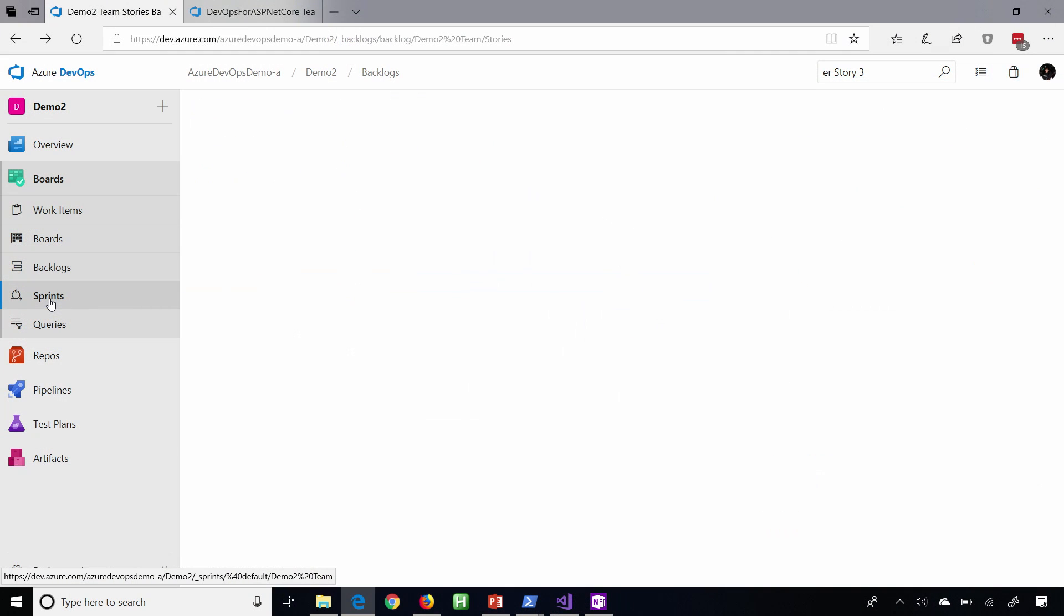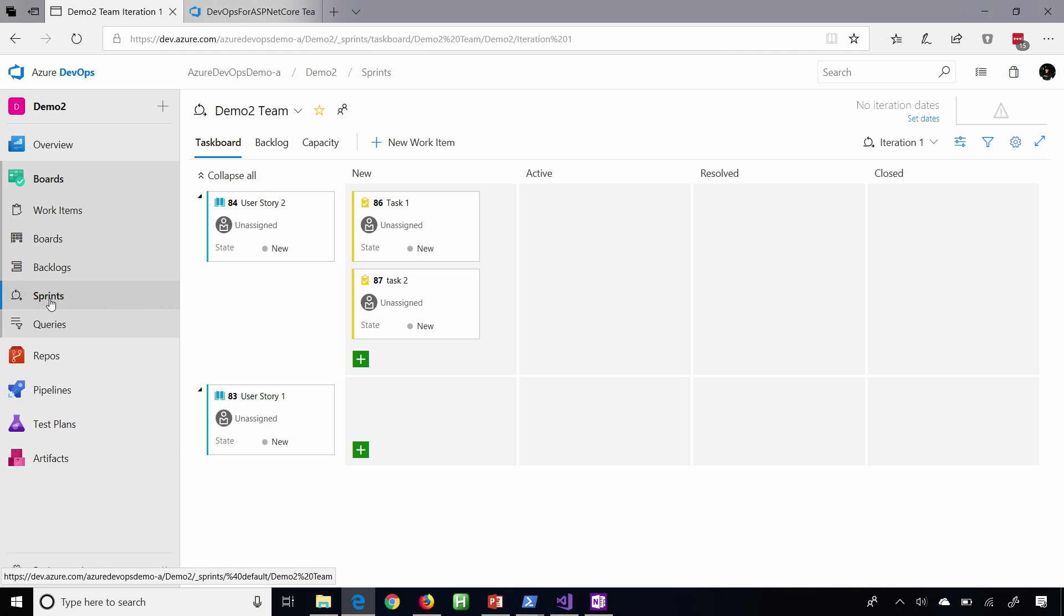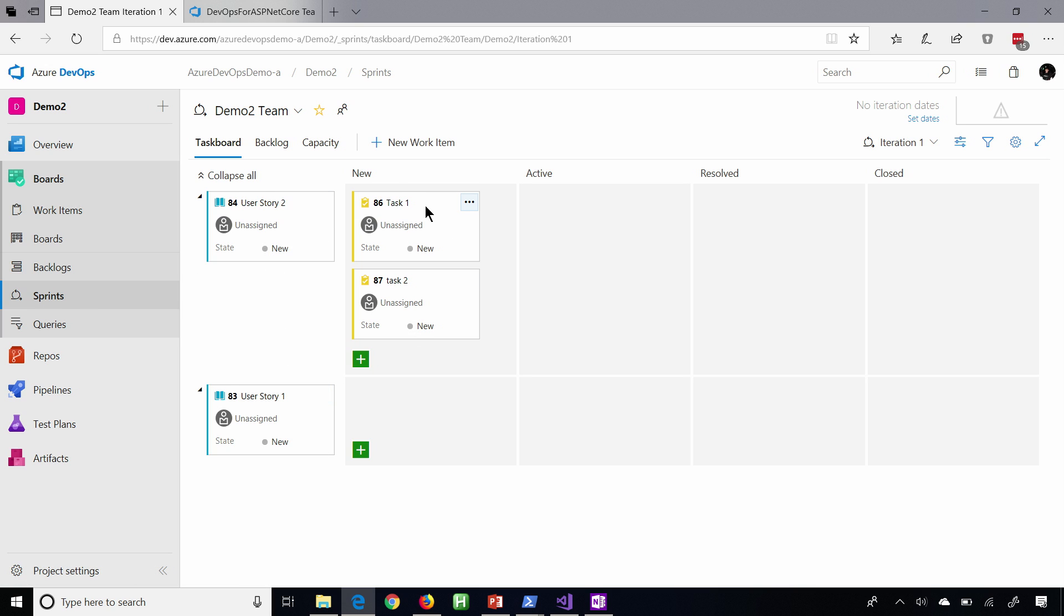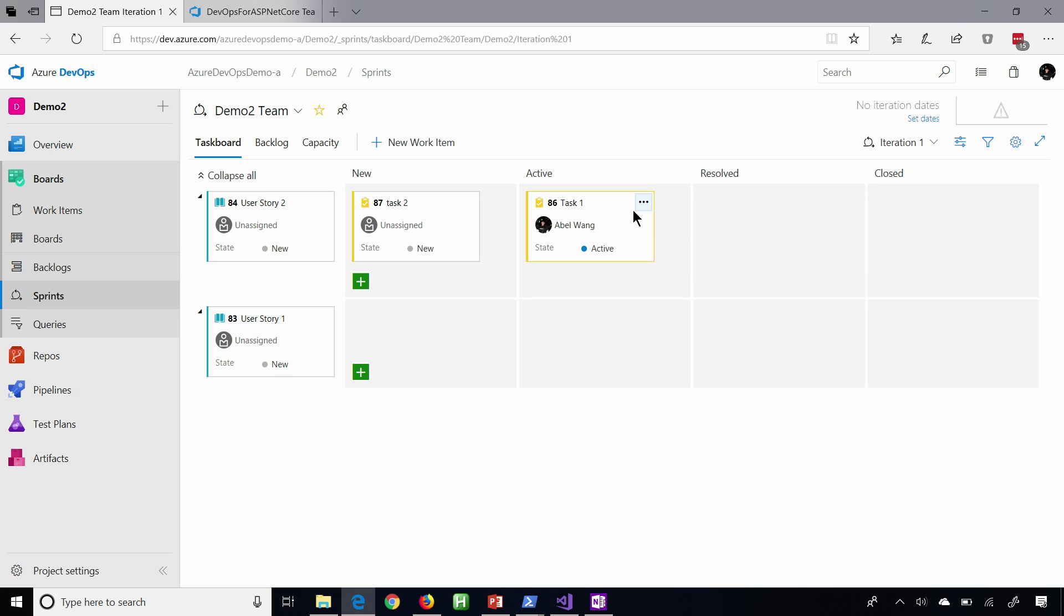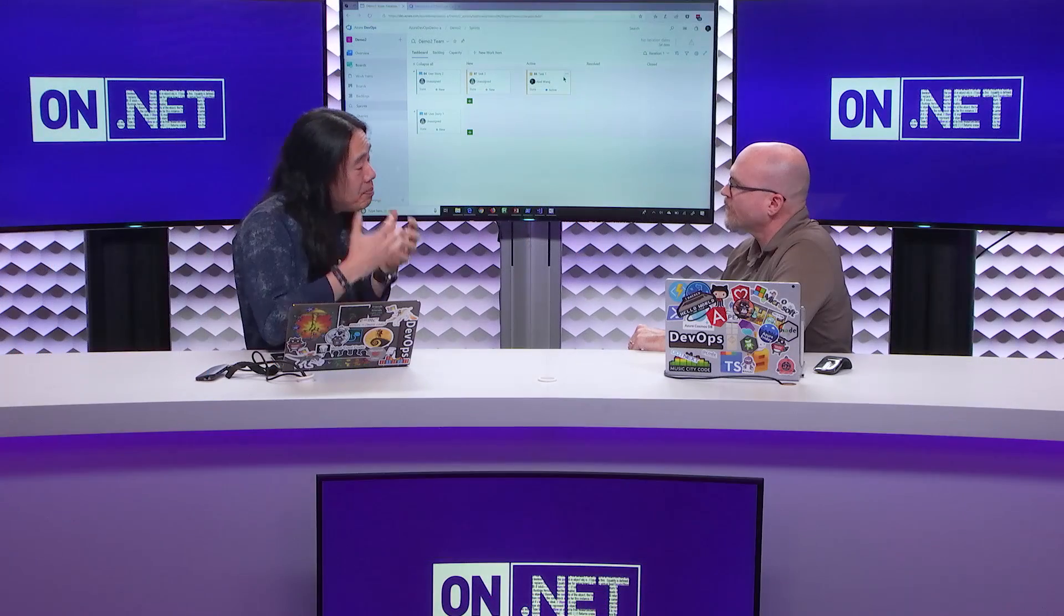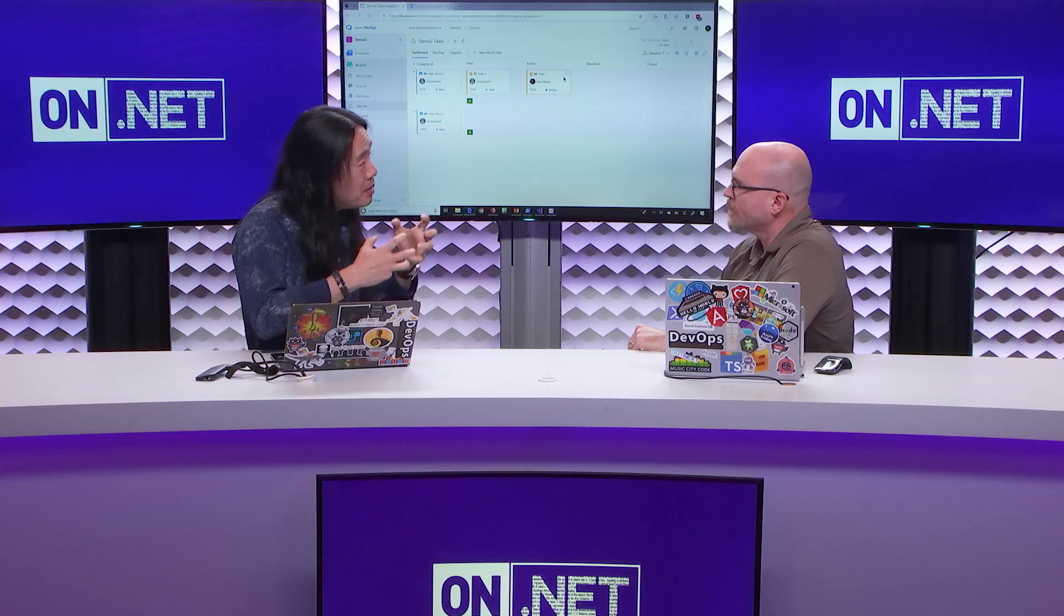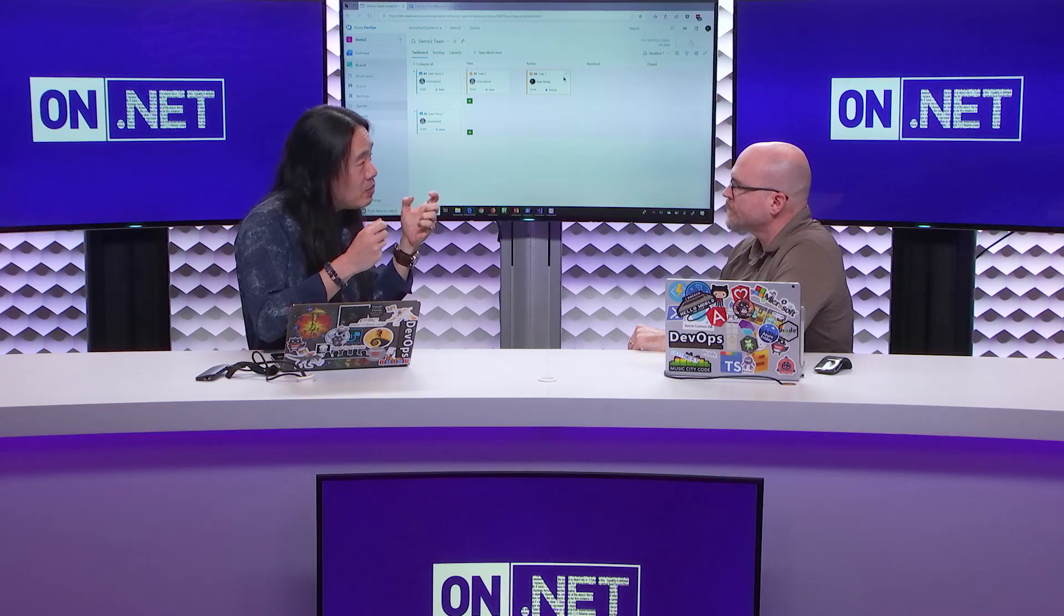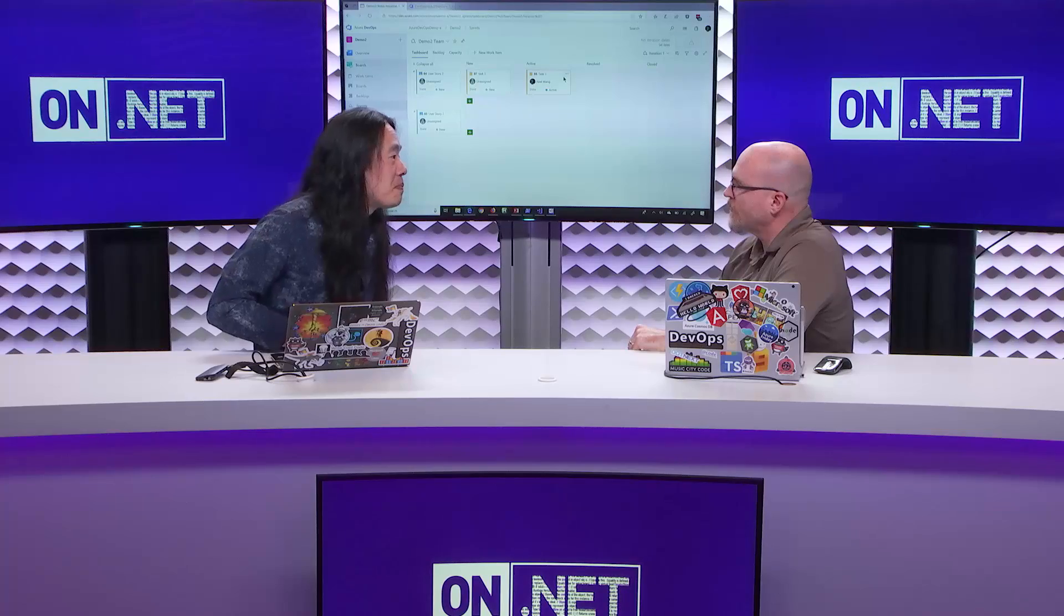So this list is great in terms of adding work, or maybe even doing some super high-level projection of, I think we're going to get about this much done by this date. But what it's not good at is tracking your work on a day-to-day basis. Right. So we have the daily stand-up or whatever. Yes. And we want a snapshot of just what's important for that day. Yeah. Just for that sprint, right? Right. Let's say our sprint is for two weeks or something like that. So then we also have a sprint view, where if we click on sprints, it'll bring us to the current sprint that's running. You notice we have the two work items broken down into the tasks. And of course, as user needs to do their work, they can just start dragging their work across the board. Well, assuming I dragged it all the way over there. Let me try that again. Okay. Well, I can't resolve it right now. But anyway. So you can just slowly walk your work items all the way across, just like that. So in a visual manner, you'll be able to see everything that's happening from one day to the next from your sprint. And by updating your work items like this, this will automatically update the times and everything like that, which means all of your burn down charts and burn up charts, those automatically get created for you.